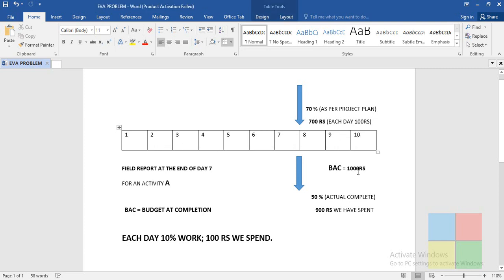We have an activity of 10 days and we have planned to spend 1000 rupees — 100 rupees each day. You can easily understand that each day we are going to finish 10 percent of work. So each day 10 percent of work; at the end of the 10th day we'll be finishing 100 percent of work.